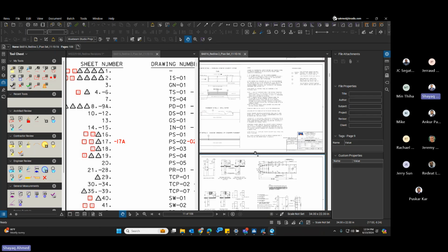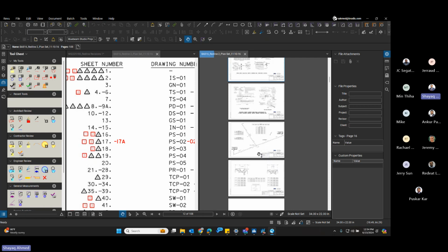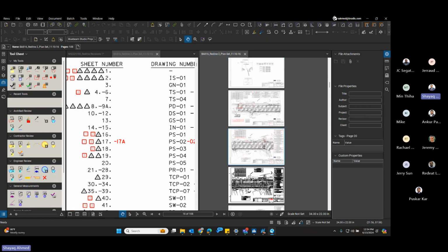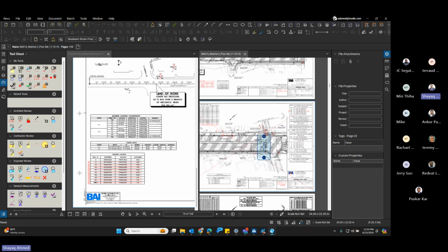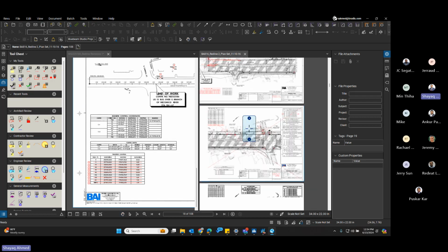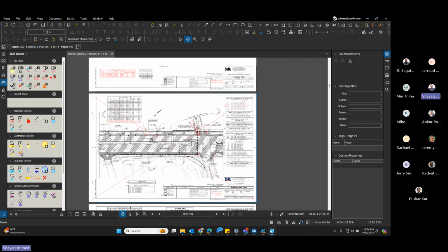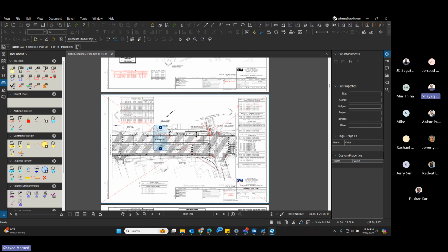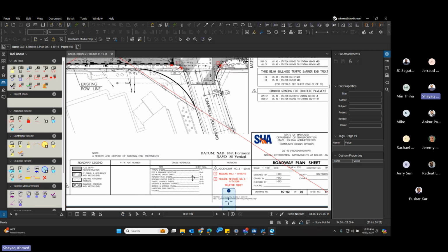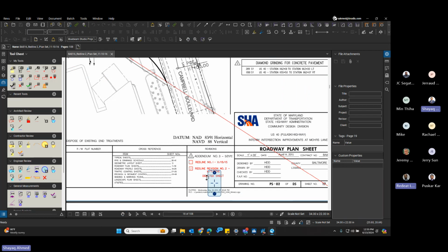Another thing, as I showed in the picture, is that there is a way to delete a sheet. Let me close this sheet. Look at this: this sheet has been completely deleted. You can delete a sheet completely if you assume there are going to be a lot of changes and a lot of confusion because of that. You delete the sheet by crossing it out and placing a redline note here, and in the redline note, just place text stating that the sheet has been deleted.